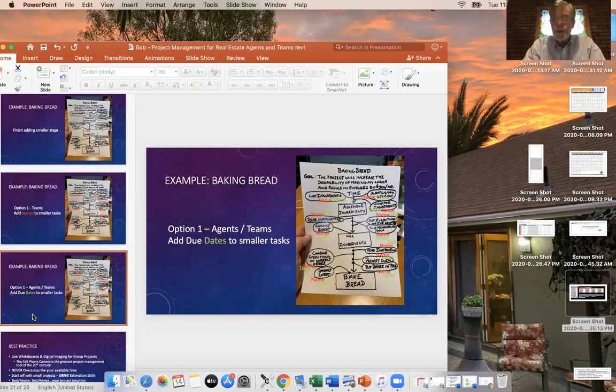Now, one thing I would like you to do in this process is, having sequenced the large and small steps, go back through and figure out how many days are going to have to pass for each of those major blocks to be done. And to do that, you have to carefully consider all the things that I listed about holidays and vacations and the actual amount of time you have to spend in any given day or week.